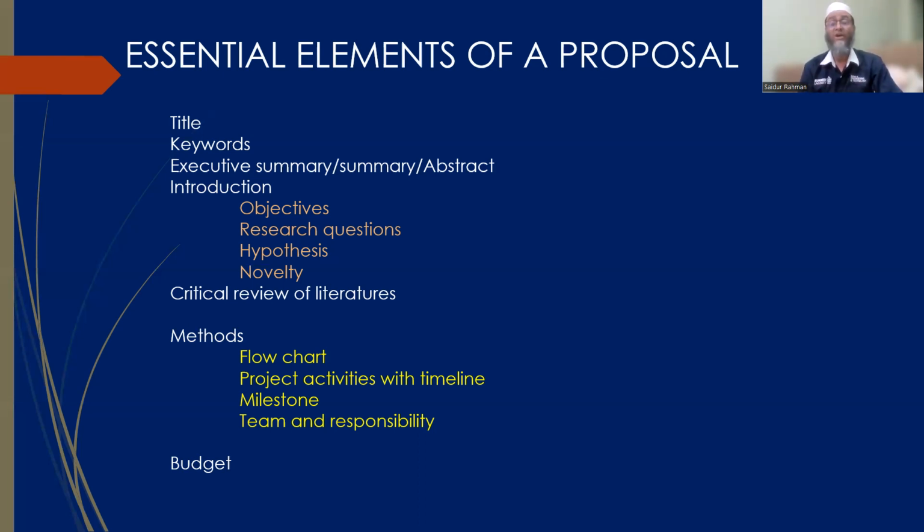And also in the proposal, when you are providing activities, you also need some specific outcome that is called a milestone. Let's say after 1 year, you are going to file a patent, or you publish a paper, or you managed to get very high breakthrough results. Low cost nanomaterial synthesis, large scale production of materials, you have achieved a certain level. Or TRL, technology readiness level 3, you achieve. So those are called milestones.